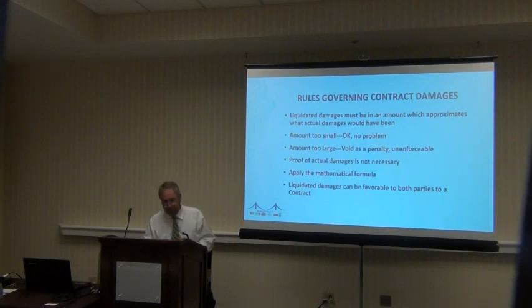But you're saying legally, even if you sign up for something crazy, $50,000 a day on a $2 million job, you have a legal right as a contractor to contest it, to object to it? Absolutely, even if you signed the agreement. Yes, sir. The legal rule is the amount of liquidated damages must approximate what the actual damages would have been absent a liquidated damage clause.